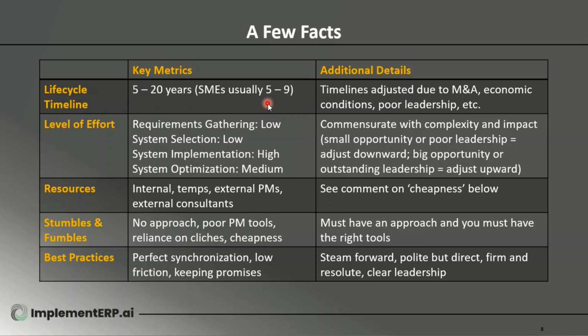I've selected an ERP system that includes, let's say, customer service, finance and accounting, admin, maybe some basic HR, definitely payroll, and then, of course, the production and fulfillment steps. That is a typical, I would say, list of modules, and that would be, if I had to say an average or a median, about 2 years.